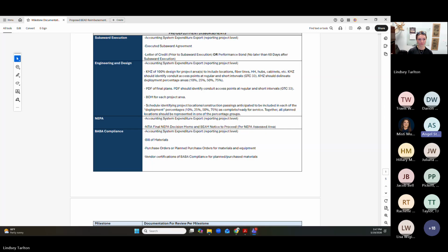Does anybody have any questions about the reimbursement milestones and everything that Lindsay has covered so far? To put all of that into a nutshell, in super simple terms, you cannot obtain the NEPA milestone reimbursement request until all NEPA assessed areas in your reporting project have the stamp of approval from NTIA and the BEAD office. So if there's a subset that gets held up for whatever reason, you cannot obtain the NEPA milestone for that reporting project.